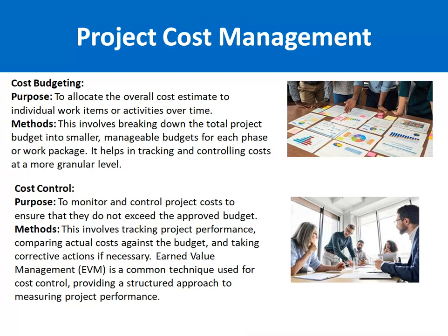Then next is the cost control. So the purpose of cost control is to monitor and control project cost to ensure that they do not exceed the overall approved budget. So this involves tracking project performance, comparing actual cost against the budget, and taking corrective actions if necessary. Earned value management (EVM) is a common technique used for cost control, providing a structured approach to measuring